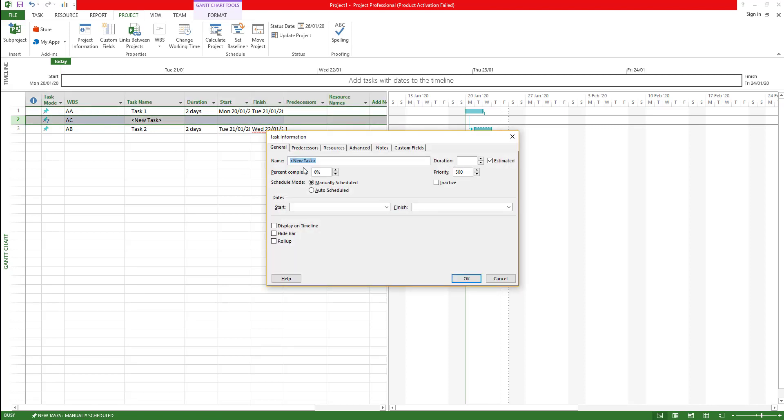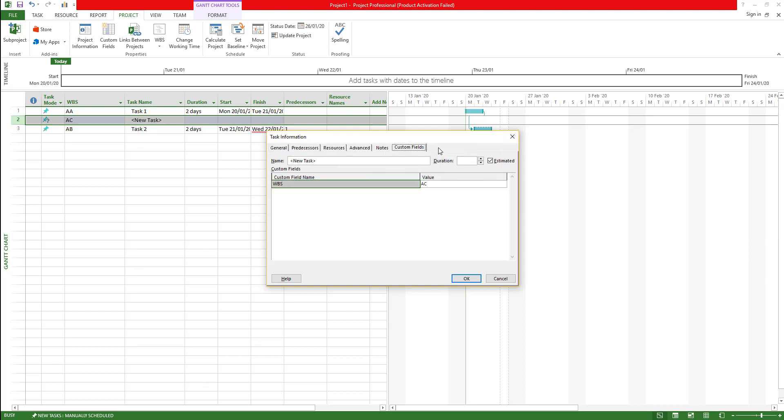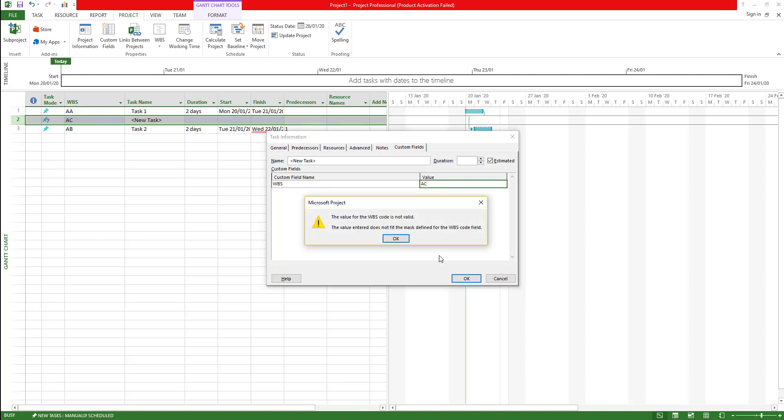You can actually double click on these ones on the task and then you can go into the details of the task which you will see later. Some of the other things that we can do is in the custom fields you can actually change the WBS code. Let's say if you enter your own test text, it actually shows you it has to be unique and it cannot have these values and stuff like that.